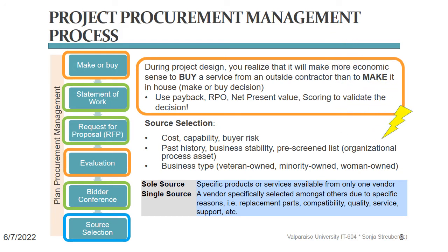I've seen this happen in my own professional life, that a subcontractor went bankrupt in the middle of their period of performance for a project I was on. They let all their staff go, and the work that they were contracted to do for us was never finished. My company, who was the buyer in that case, had to go through a number of legal steps to get at least the partial code from the insolvency mass, and that was a long and messy process. Needless to say that this delayed our project by a lot because we now had to hire people to finish what we thought we had purchased.